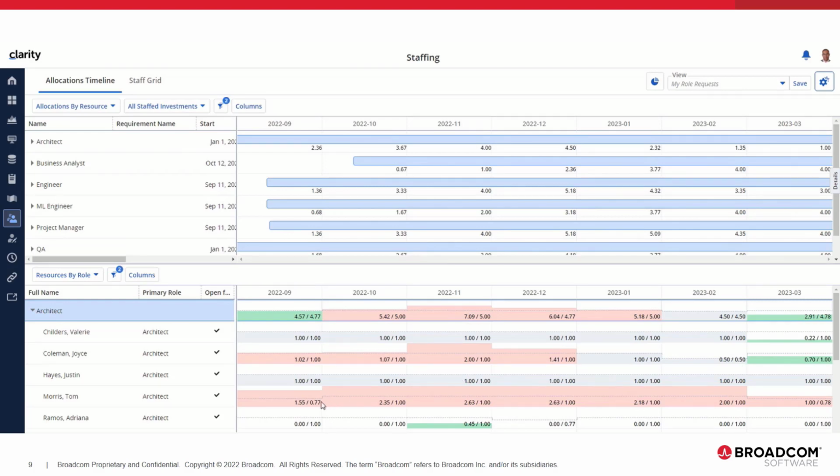And if we look at Tom, the 136 hours as compared to 176 hours is really a 0.77 full-time equivalent, and all the other employees are having 176 hours, which is the same as the company standard calendar. And then the allocation is also being converted to that full-time equivalent. Adriana has a similar number because she is off for 40 hours and is only working 3 weeks in the month of December, whereas all the other employees have an availability rate of 4 weeks, or 1 FTE.